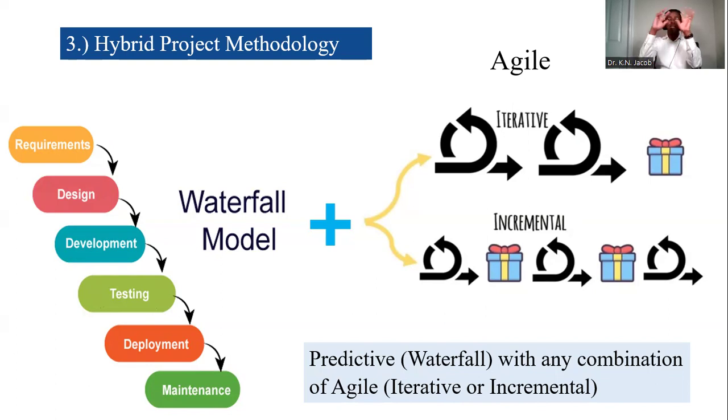Now, the body part, you can use the waterfall, predictive traditional approach, because the body of a car is known. It has been done there for over a century. So in terms of the body, the tires, the engine, the transmission, the car seats, everything to do with the body of the vehicle, we can use the predictive approach. But in terms of the software that is built in that vehicle, we are going to use Agile.